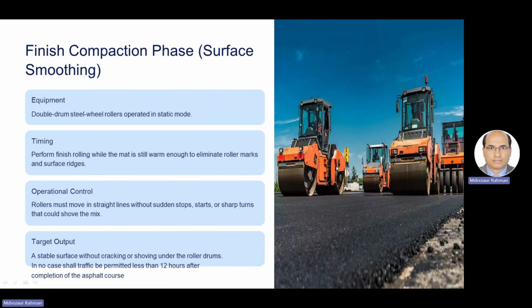When rolling is finished, then we have to wait minimum 12 hours for traffic. Before 12 hours, we cannot. Minimum 12 hours? No, it's 3 to 4 hours. No, 12 hours, and as per ETQCC, 12 hours. At least 24 hours. How much more? 7 days minimum, traffic not allowed. Even 7 days is not mentioned, but always minimum 7 days.